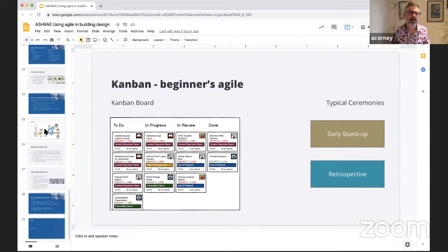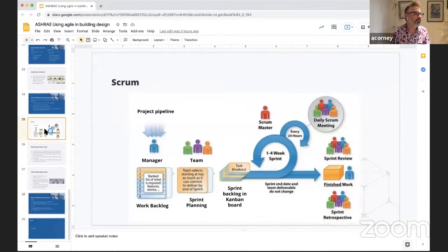In Scrum, the way it's supposed to work is that when the team is working out in the planning session which tasks to do, they actually vote on each of these tasks. Each person votes at the same time on how long they think that task is going to take. And if they think it's going to take a really long time, then they use the planning session to break it up into smaller tasks, and then they vote on the smaller tasks, right?